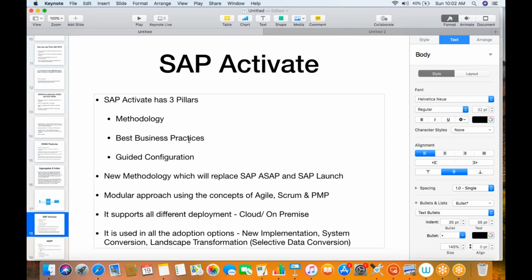That is where our expertise will come into place, right? So for example, if you think that one process is dependent on another, so till the time the second process is not developed, we cannot implement the first process. So that particular process can be skipped in the first modular approach. So whatever is fit, you can implement that. Whatever is not fit, if you think that whatever is fit is not enough, you cannot go ahead only with these changes, then maybe whatever are the mandatory things to develop, wait for that and then go for the first phase.